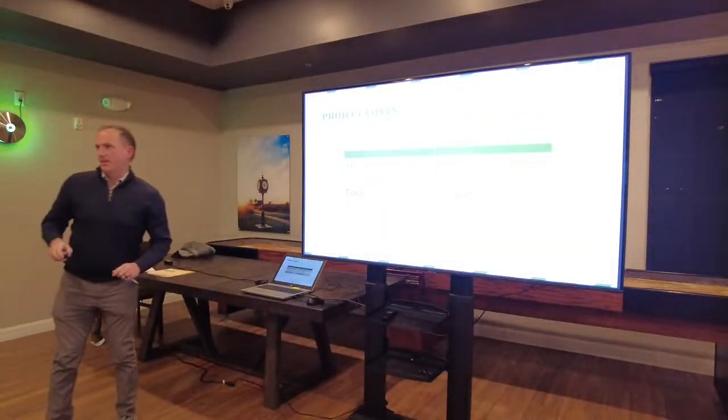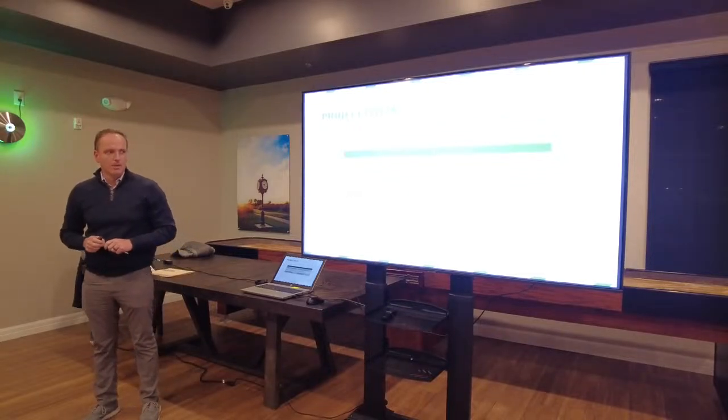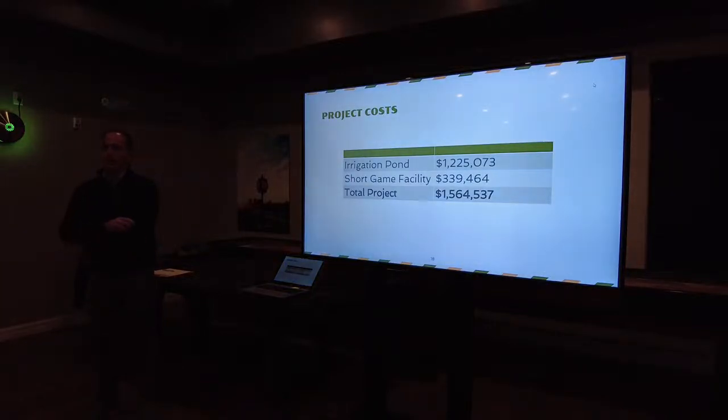All right, so what does everything cost? We have our annual meeting ballot coming up. So, bids on the project came in at just under $1.6 million. Just over $1.2 million on the irrigation pond, $340,000 on the short game area. So why did we combine these two together?